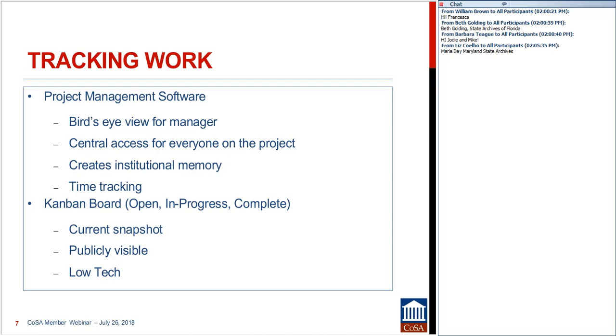As you will remember from our conversation last time, one of the hardest things to do as a project manager in planning for a project is actually estimating how long things are going to take. And so this feature of allowing everyone to track the amount of time that they invest in doing their work is really beneficial to smooth and efficient planning and executing of projects going forward.